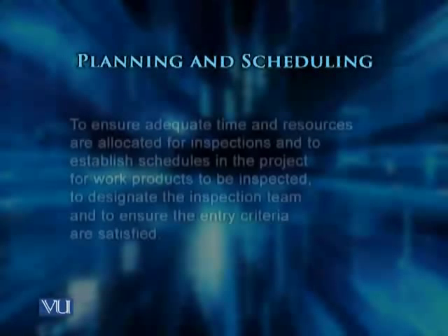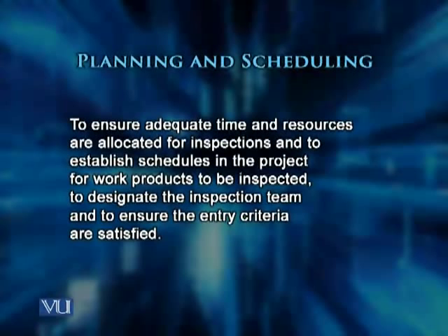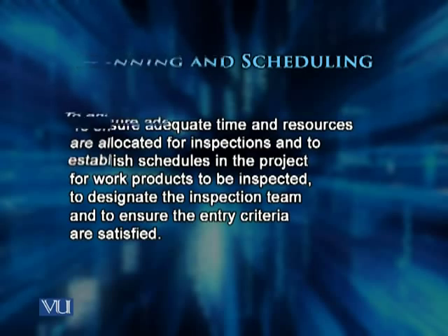You can see the entry criteria for the activity, the task, the validation process, and the exit criteria. Now, what's the purpose of planning and scheduling? To ensure adequate time and resources are allocated for inspections, to establish schedules in the project for work products to be inspected, to designate the inspection team, and to ensure entry criteria are satisfied. So these are the preparatory activities for the inspections to be performed. Here we are very clear that we are going to allow adequate time and resources to perform software inspections. Without that, the inspections will certainly fail.